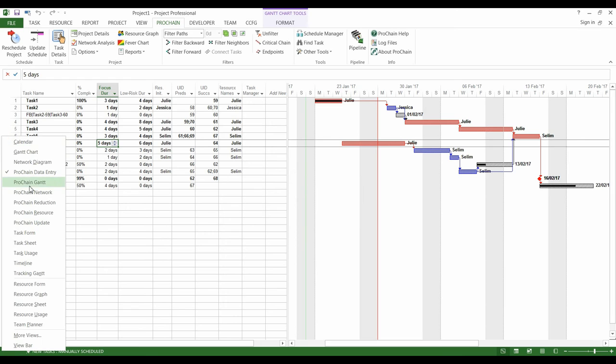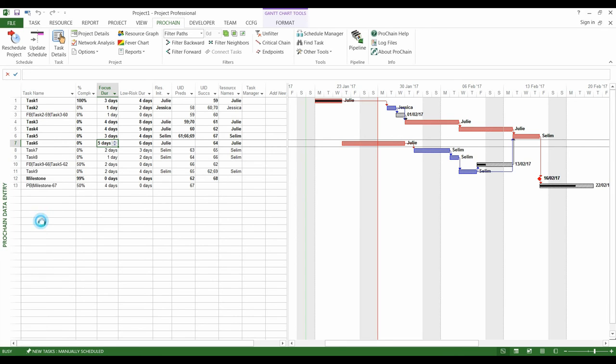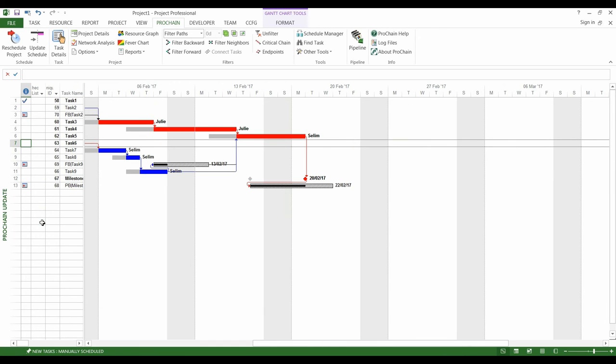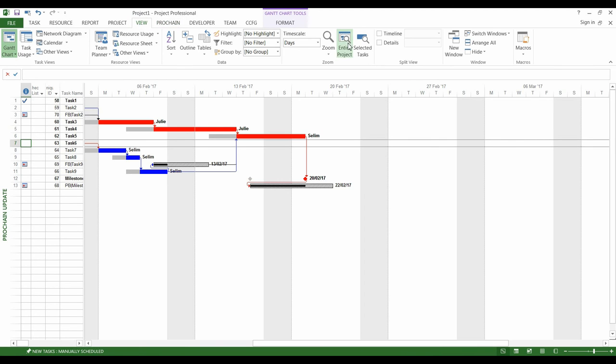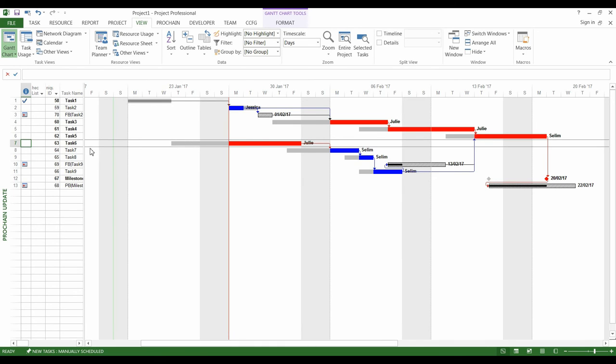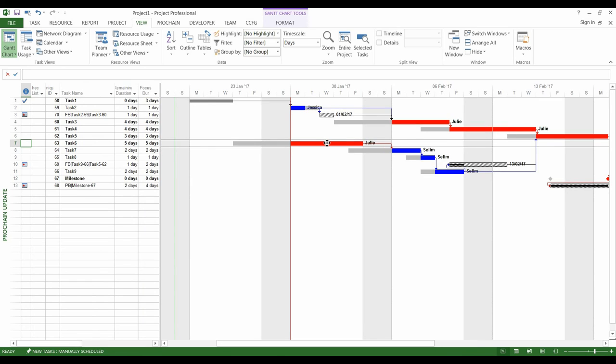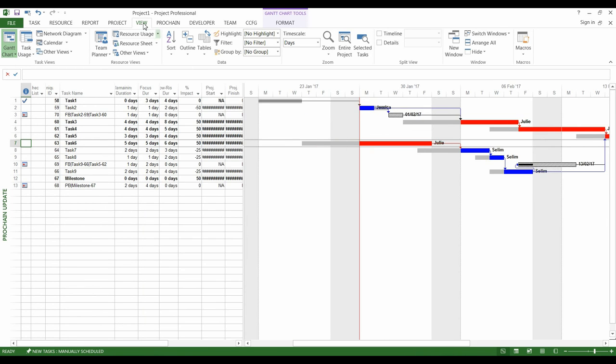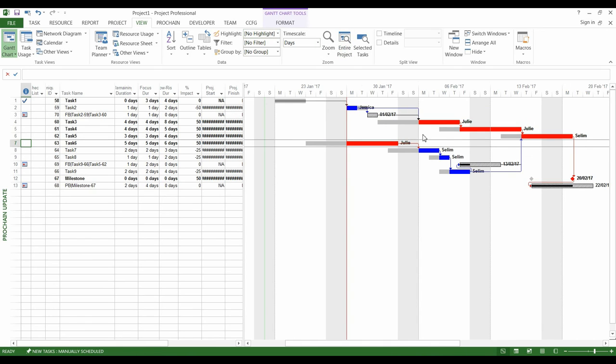And in the appropriate view, it is possible to observe the delays of the various tasks compared to the initial schedule. Task number 6 has been delayed, because it had to start within the week that passed, but it didn't, so it postponed the rest of the Critical Chain, but also the Feeding Chains in blue.